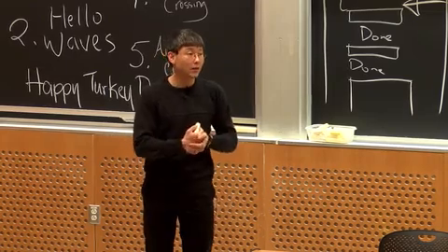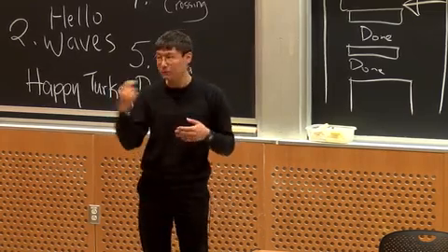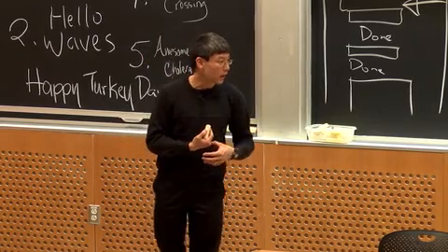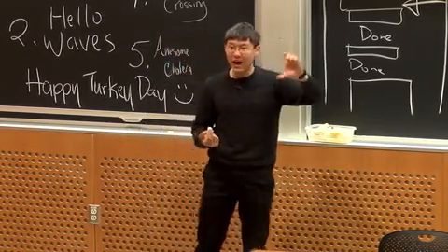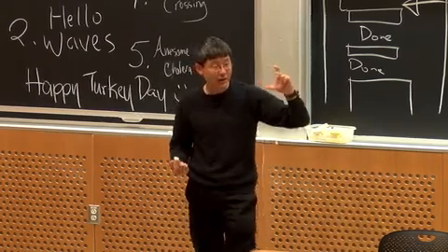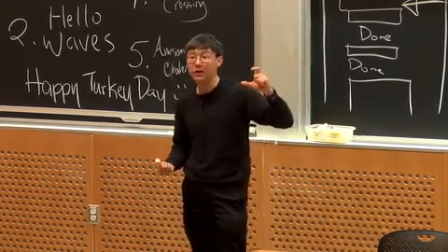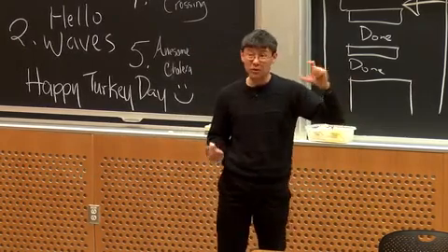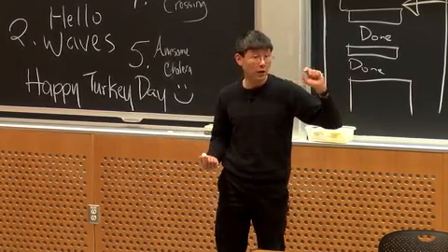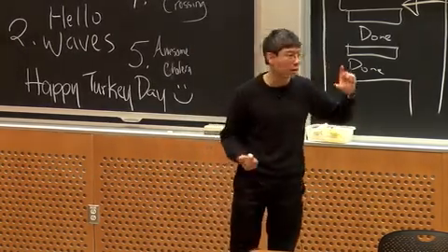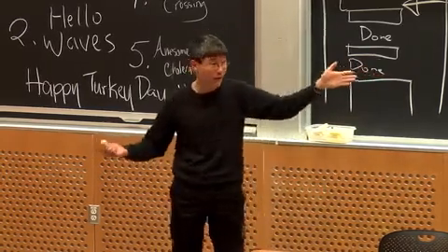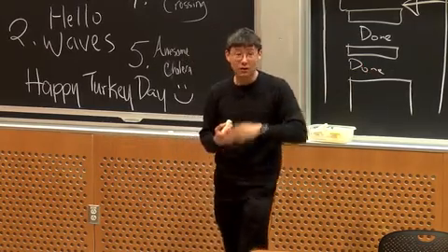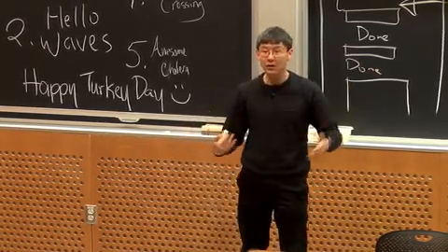So something that will be useful before you depart class today is to actually figure out, of all of the things that are the highest priority and undone right now, what is really the most important thing? And who's responsible for that, right? In fact, all of your highest priority tasks should all be assigned to somebody. And you should have a good sense of what order or priority they are.